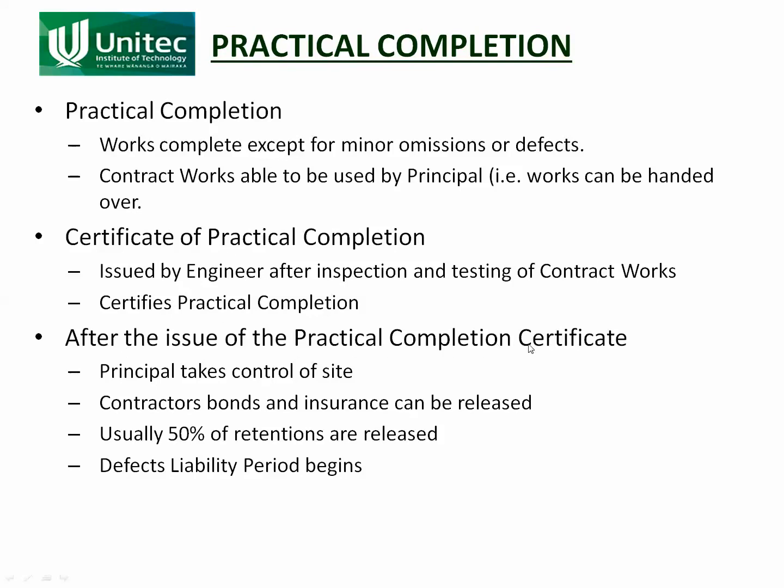When the practical completion certificate has been issued, the contractor is deemed to have fulfilled his obligations. The principal has control of the site — if it's a road, the principal can start driving cars over it; if it's a building, he can start occupying it. Up until then, the contractor has possession of the site and the principal cannot do that. So possession of the site is no longer the contractor's — it is now the principal's.